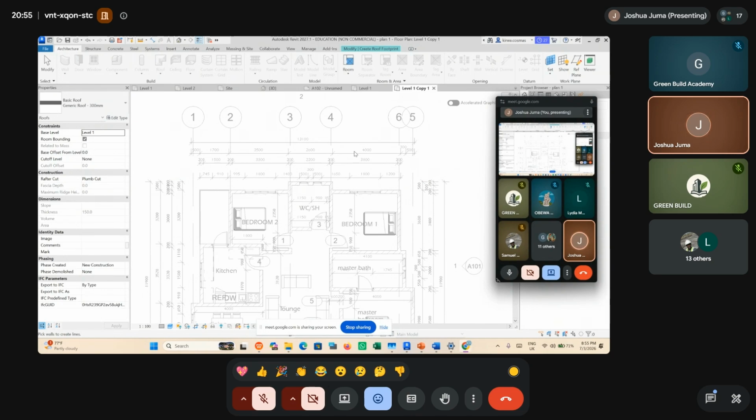But for the costing, we'll talk about schedules that you can use. Because we will be having schedules, and they are wall schedules if you want quantities of walls, because Revit can give you the exact length and area of external walls. If you want the length, we can modify it to give the length.